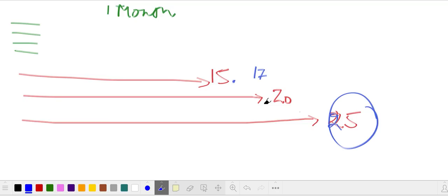That's completely fine. Anyhow, it is less than 25 days, and all these activities are going in parallel. So when someone asks me how much time in total I'm going to take to complete this project, my answer would be 25, because that is the longest activity.